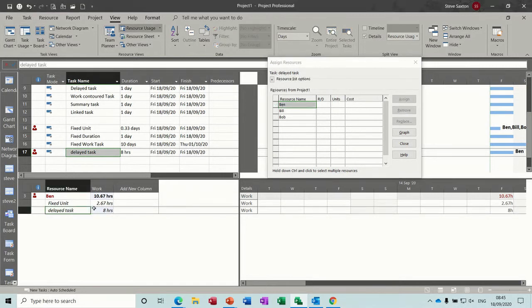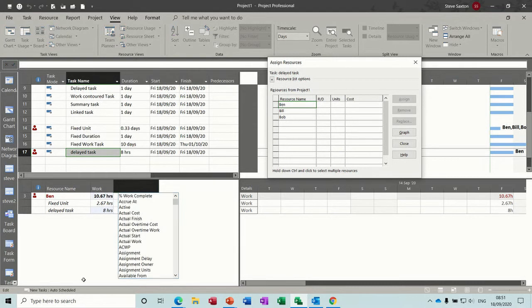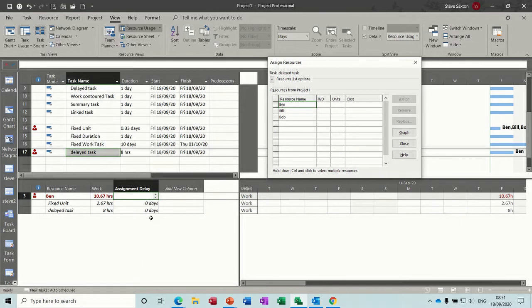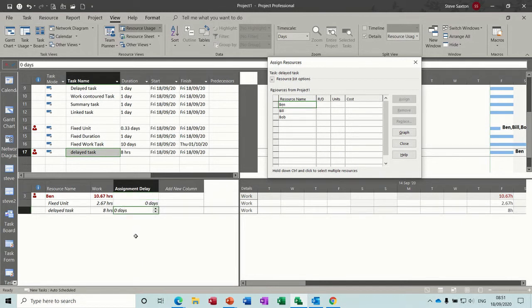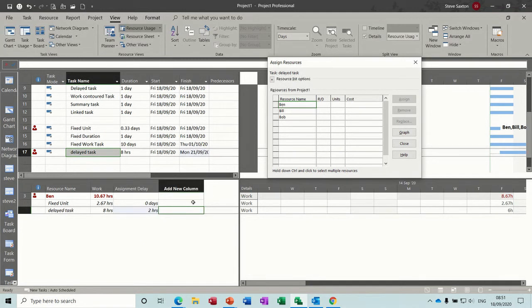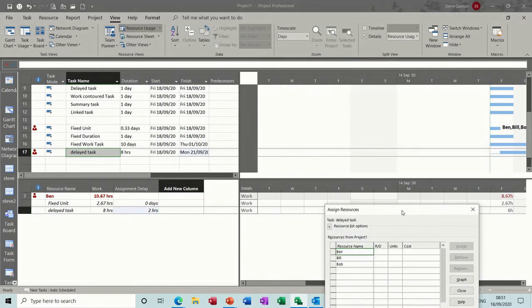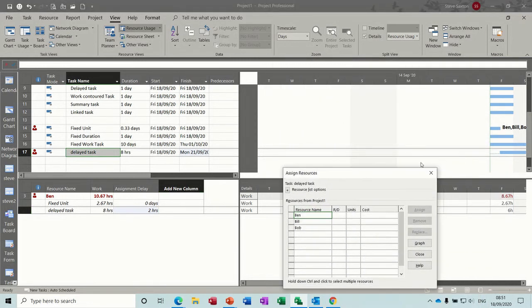So this delayed task, I need to add assignment delay. So I should just be able to, in fact, I can see it there, assignment delay. So this is what we're going to do. I want this to be a two hour delay, two hours, click away from that, and then that will give it a two hour delay. So you can see on the Gantt chart there...